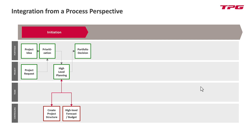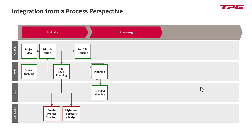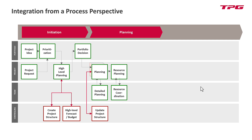With all that, we come to a portfolio decision, where new projects are now being planned in higher detail. We go into detail planning phase — set up the schedule — and there might be distributed planning between projects and teams, depending on the resource management process in place. This usually leads to an update of the project structure as things change. Resource planning is typically a two-step process coordinating between teams with resources and project managers with content and scope.